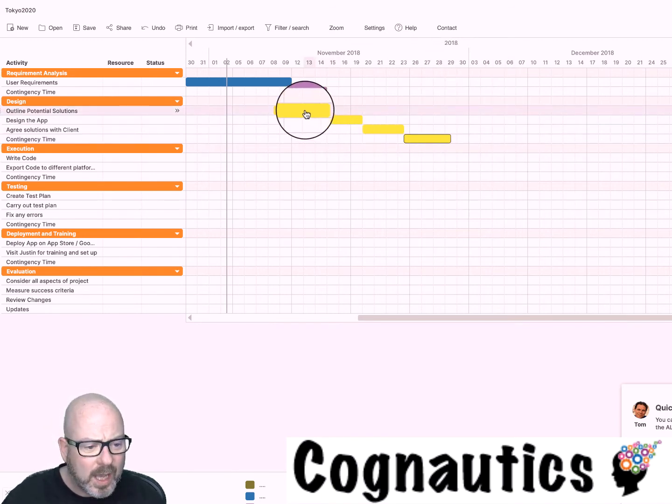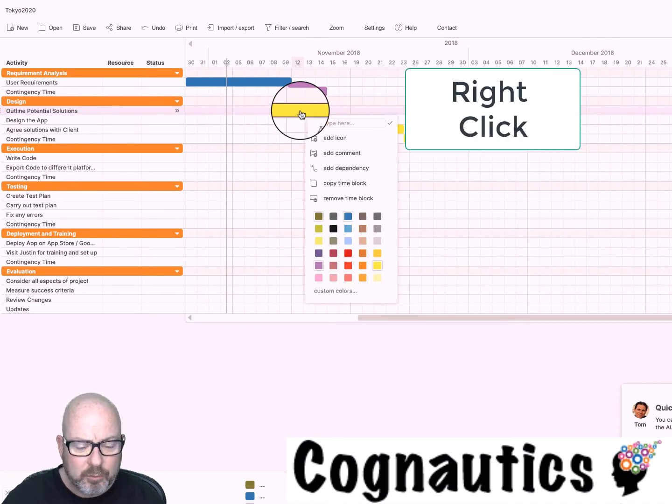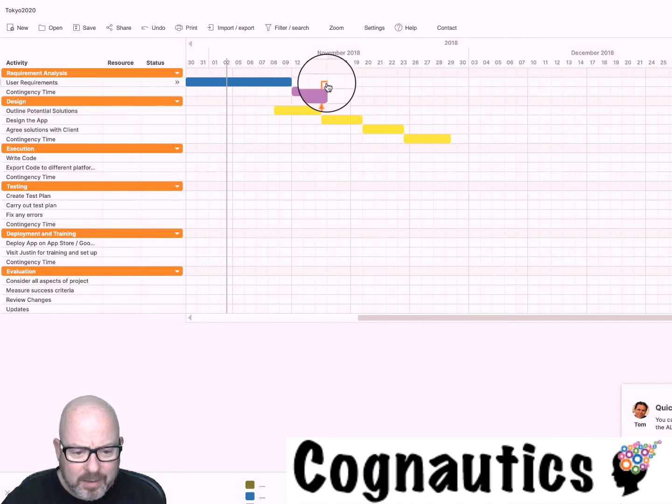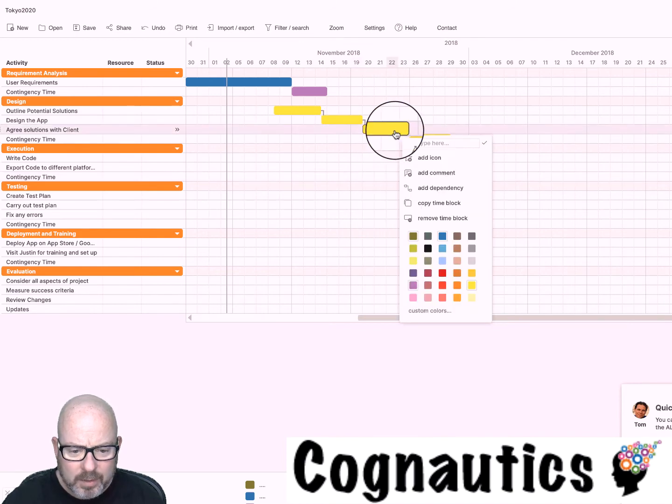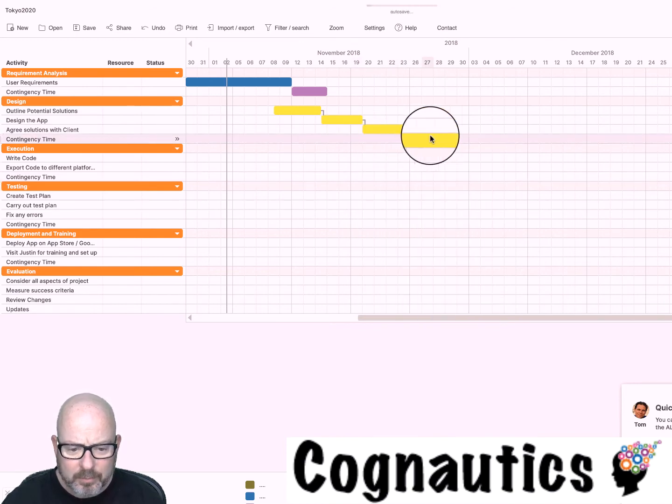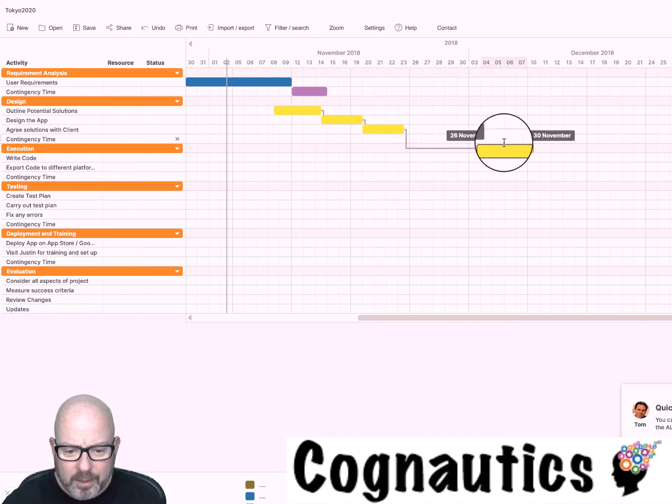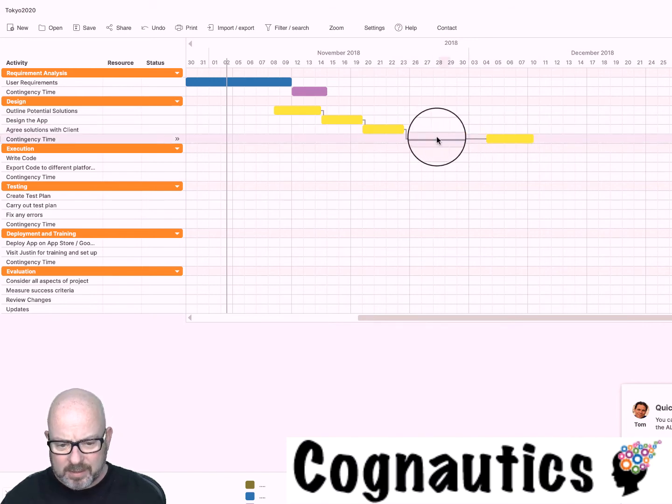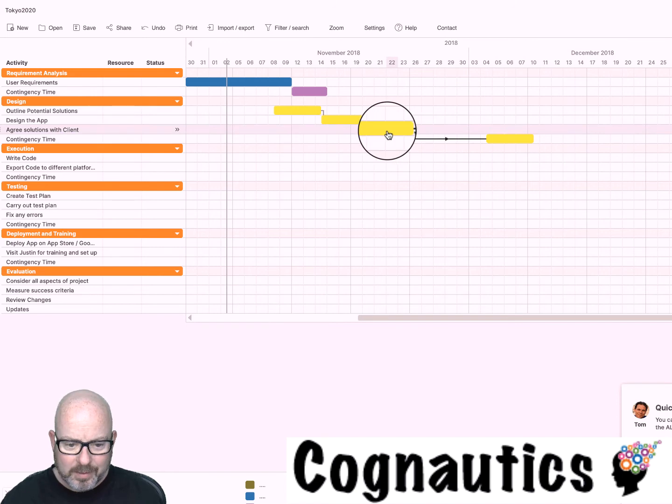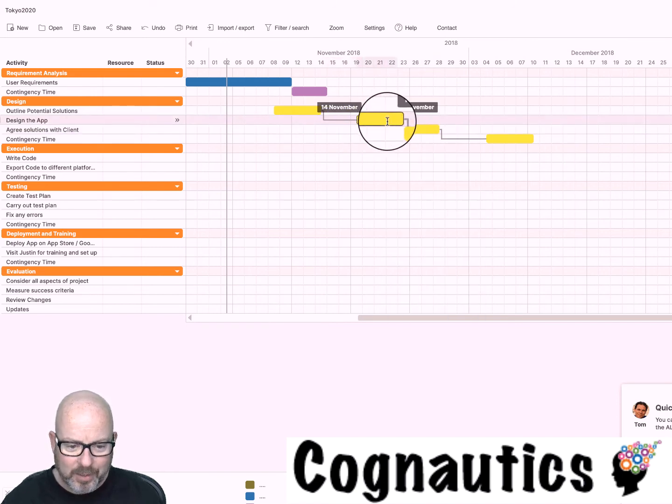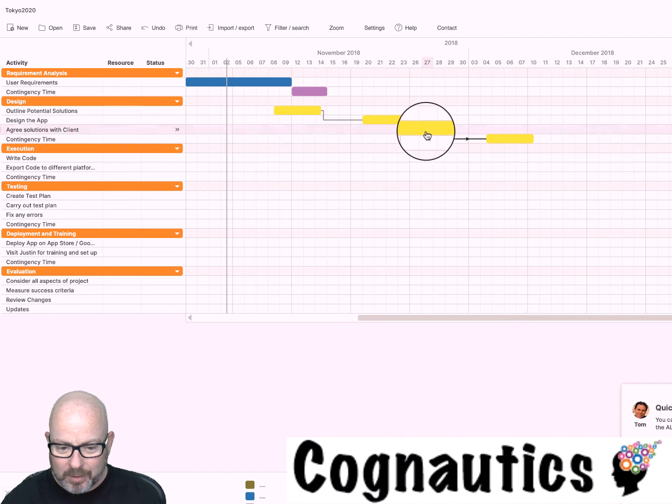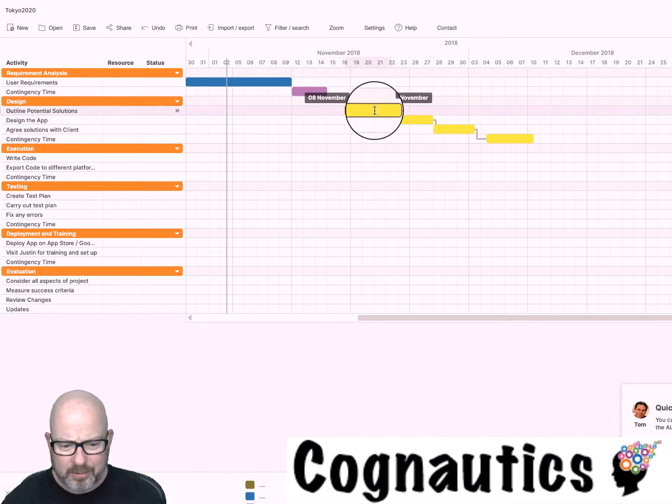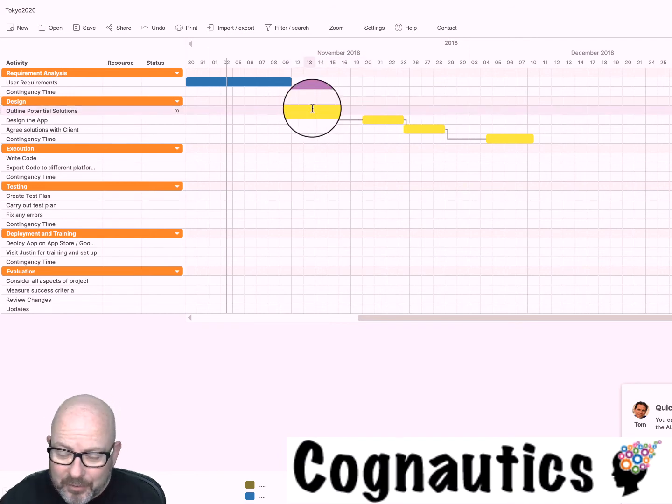This works in exactly the same way and you can use a little trick called dependencies. Let's go to outline potential solutions here and I'm going to right click, click on add dependency, and then click on the thing that it's dependent on. Can you see it's put a little arrow there? Now look what happens when I move this block of time. It's saying this is dependent on this being done so I can't go onto this one until this one is done. When I move this block forwards it moves the block below it with it because this block is dependent upon this task being done first.